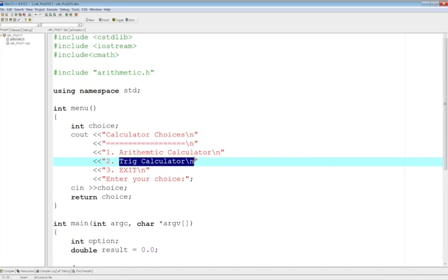Scope creep happens is when you start designing things and then all of a sudden you're adding features that weren't part of the requirements or were not part of the vision for the user, and you start drifting, or maybe while you're meeting with the client, after you've agreed on the scope of the job, suddenly the client is like, oh yeah, by the way, I would like to have cotangent. Well, that's great, we can do it, but it's a different project or a different cost. You're gonna have to negotiate. You have something to negotiate with. Versus if you just said yes, for the same cost you've done everything else,